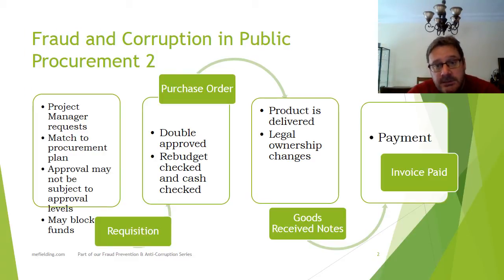And then the person in the purchase order department will also see that it's been approved by the right person, it's going to the right place, and there's correct backup and justifications for it. When you get to larger items, you may find that you need 3 different suppliers. So you may find that they've shown that 3 different shops sell iPhones.